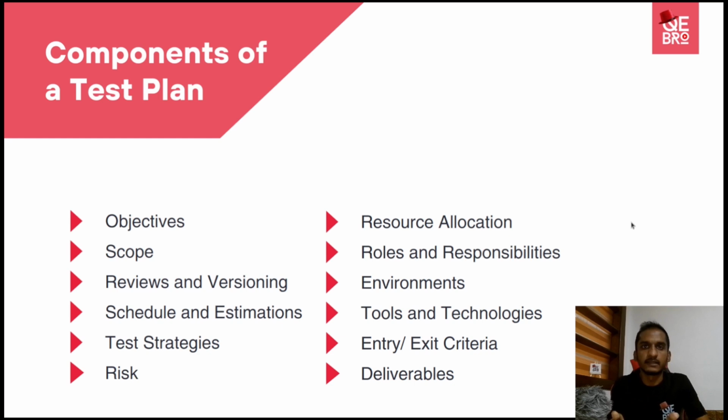So for us to start testing, that team needs to deliver the components, and that also needs to be deployed in our environment. And also maybe some test data preparation or environment readiness, those things we can mention under the entry criteria. And also maybe unit testing pass, or those things we can include based on your need.